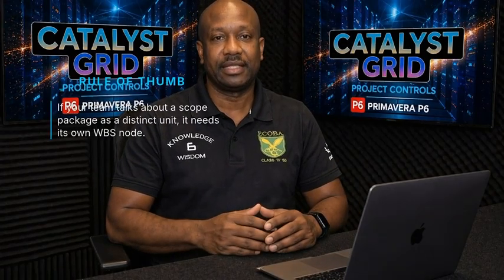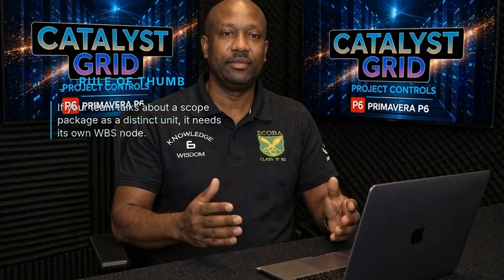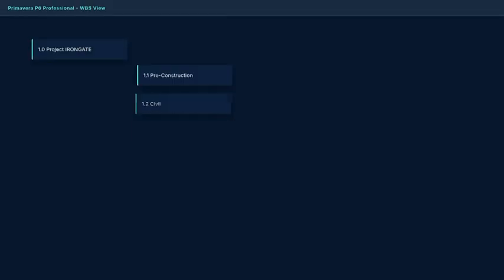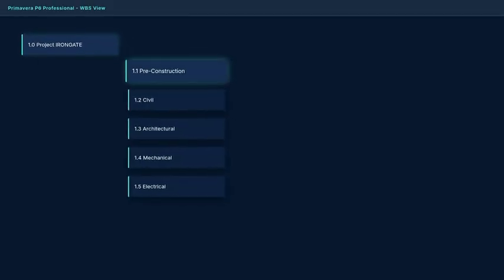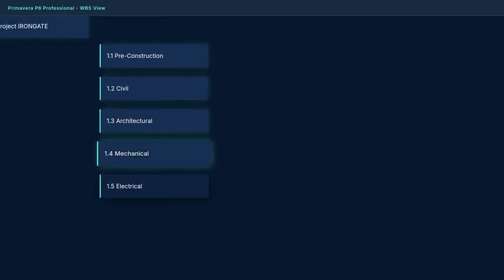A good rule of thumb, if your project team would talk about a scope package as a distinct unit, it needs a WBS node. In P6, open your project and go to the WBS view. Build your hierarchy to match your contracts and reporting needs.